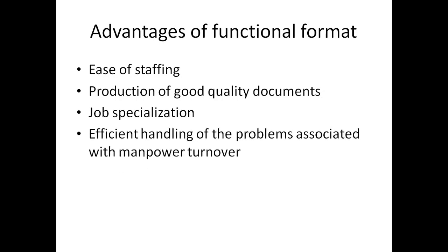and also there will be efficient handling of problems associated with manpower turnover. Because in the software industry, the people working in the software industry will always leave that company and jump to some other company. So in the case of functional formatting, we can properly manage that manpower turnover, because even if some designers leave, there will be some designers in the company who are specialized in design.